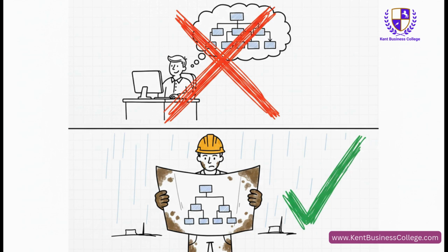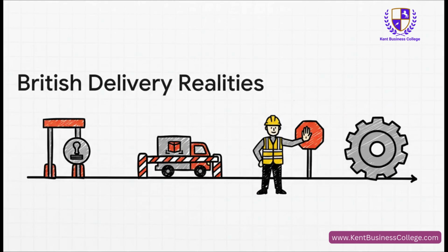This can't be some fantasy you've dreamt up from the comfort of a warm office. It has to be grounded in reality, out there in the mud, the wind, and the rain. You've got to get in the heads of the people who are physically doing the work. And that means thinking about all the real-world headaches that come with any job, especially here. You can't just show up and start digging a hole, can you? You need permits, you need approvals. Materials don't just magically appear. You've got lead times, supply chains, and don't even get me started on the safety paperwork, the assurance gates, or trying to work around a live operational environment. All that stuff, all that real-world grief, it has to be baked right into your logic from day one.